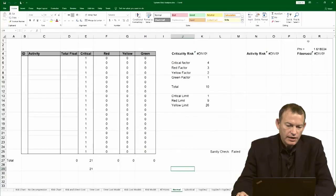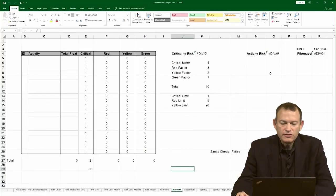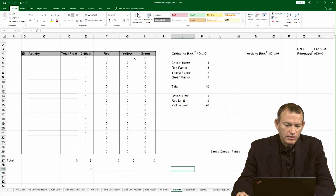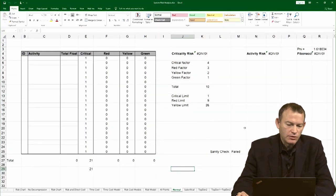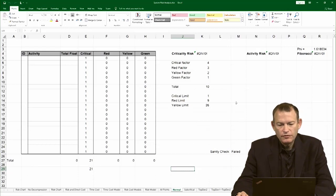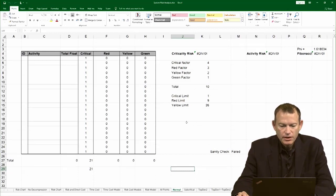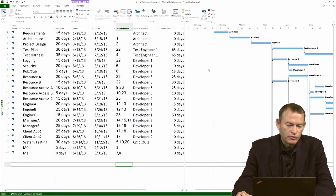Here I have the system risk analysis file on the normal tab with an empty placeholder table for calculating the risk. I'm going to harvest the values for it from Microsoft Project. The first thing you do is open up the project file for your project.